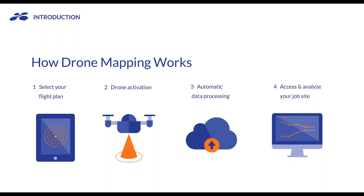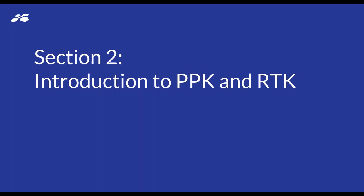The general drone mapping process for a fully managed solution: you select your flight plan, activate the drone, it takes off, flies in a lawnmower pattern capturing all the data, comes back, and lands itself. The data is automatically processed into useful three-dimensional progress reports, and you can access and analyze your job site to get the insights you need. In general, you can capture around 100 acres in 10 minutes, get the data back in hours — often the same day.